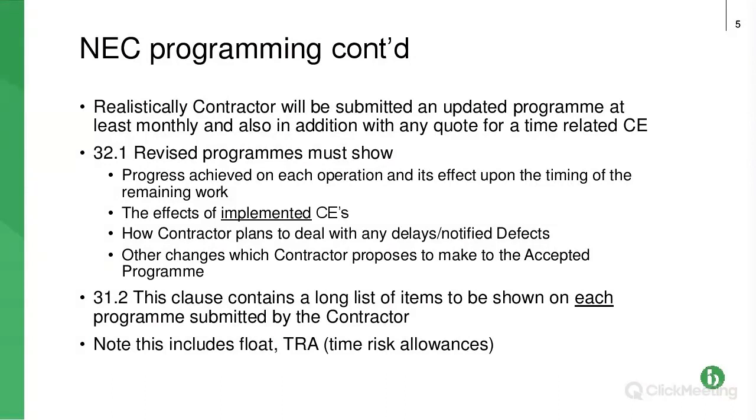I mean, my inclination is, how these programmes are used is that if you come to make a claim, whether it's a claim that's negotiated and you reach a settlement, or a claim where you're starting and progressing via adjudication or court proceedings, the key thing is that we have documentation to evidence the position. So I think if I were a programmer, I would be inclined to include unimplemented compensation events as well.